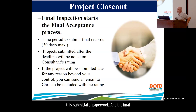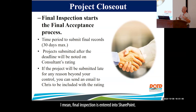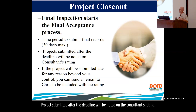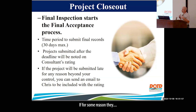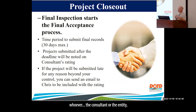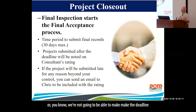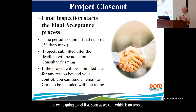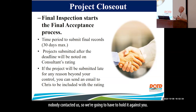What starts this submittal of paperwork? The final inspection starts the final acceptance process. Once the final inspection is entered into SharePoint, it prompts me to generate the final acceptance letter. Once I generate that letter and the chief signs it, you have 30 days to get those records submitted. Projects submitted after the deadline will be noted on the consultant's rating. If there's a delay, just send us an email explaining the reason — we'll work with you, but we need to know.